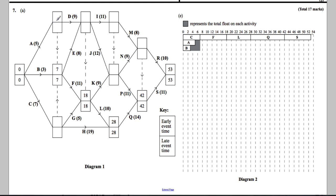How do we get to here? Well, the only option is to go via 5. We can't go via B because the arrows are going the wrong way. So 5 has to be that number. This one's already completed — it's 7 because we could go 3, or we could go via C giving 7. So we pick the biggest out of 3 and 7, which is 7. And in 7, clearly.